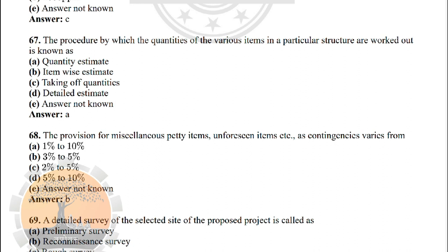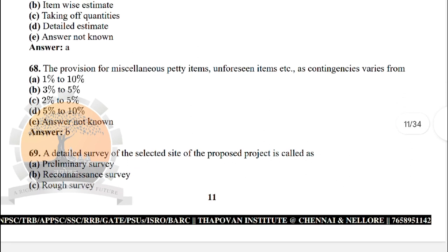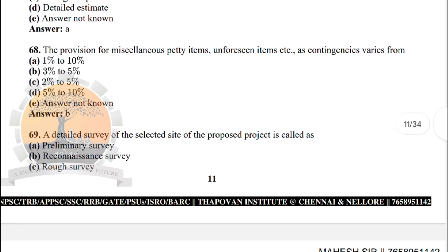Next: the procedure by which the quantities of various items in a particular structure are worked out is known as — the correct answer is option A: quantity estimate. Next: the provision for miscellaneous and unforeseen items and contingencies varies from — the correct answer is option B: 3 to 5 percentage.